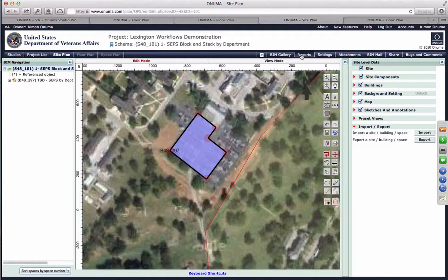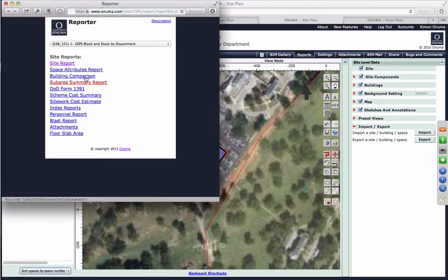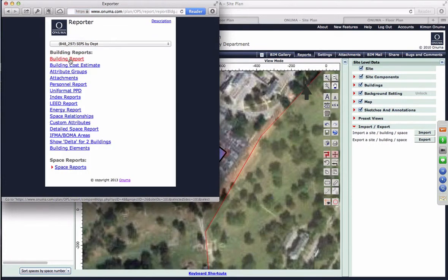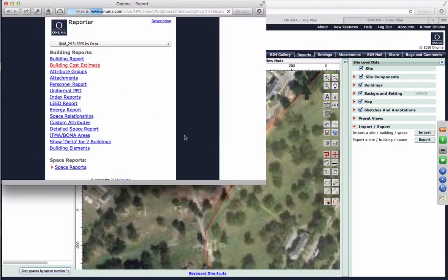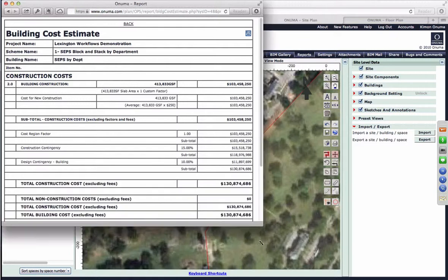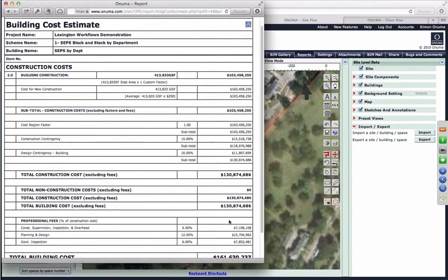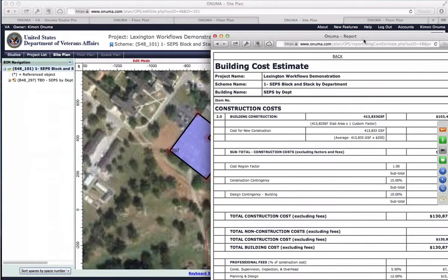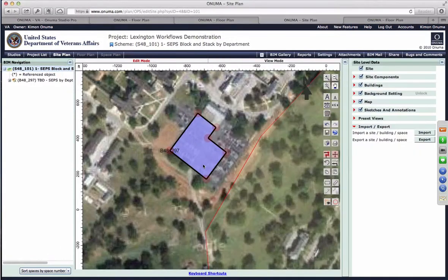And all of this is, as we're moving this around, it does create an initial cost estimate, for example. You can say, okay, give me a cost estimate from this. It's obviously a very early one, and it's based on just square footages, but we can change those assumptions. And as we're stretching things around, the cost and the square footage and all the reports essentially are automatically created from that stretch that I just did. Actually changed that floor plate.